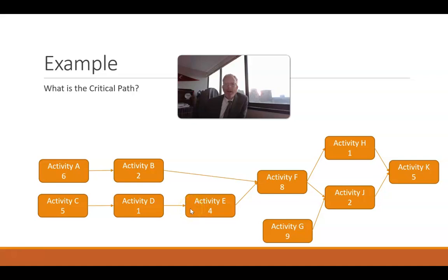Okay. So right now the total of 10 days is looking like the longest path, obviously 10 is greater than 8, 10 plus 8. But then we also have to consider, okay, total of 18 days, by the way. We also have to consider that's a prerequisite for activity J. So is activity G. Okay, so A, D, E, F is effectively running in parallel with G. Whichever of those takes the longer time will be the critical path. We know that A, D, E, F is 18 days. G is 9 days.